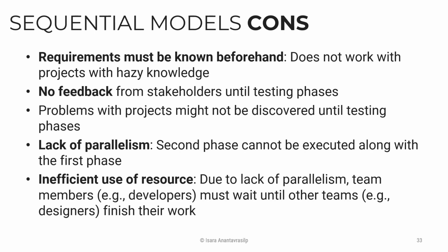projects. But then you need a lot of projects running at the same time, and it also makes the project management and cross project management a little bit difficult as well, because if in your current project, the SA finishes the work already and every design is done, and the development team is still stuck in other projects and cannot move to this project just yet, then this project comes to a halt, right? You don't want that. It is very inefficient.